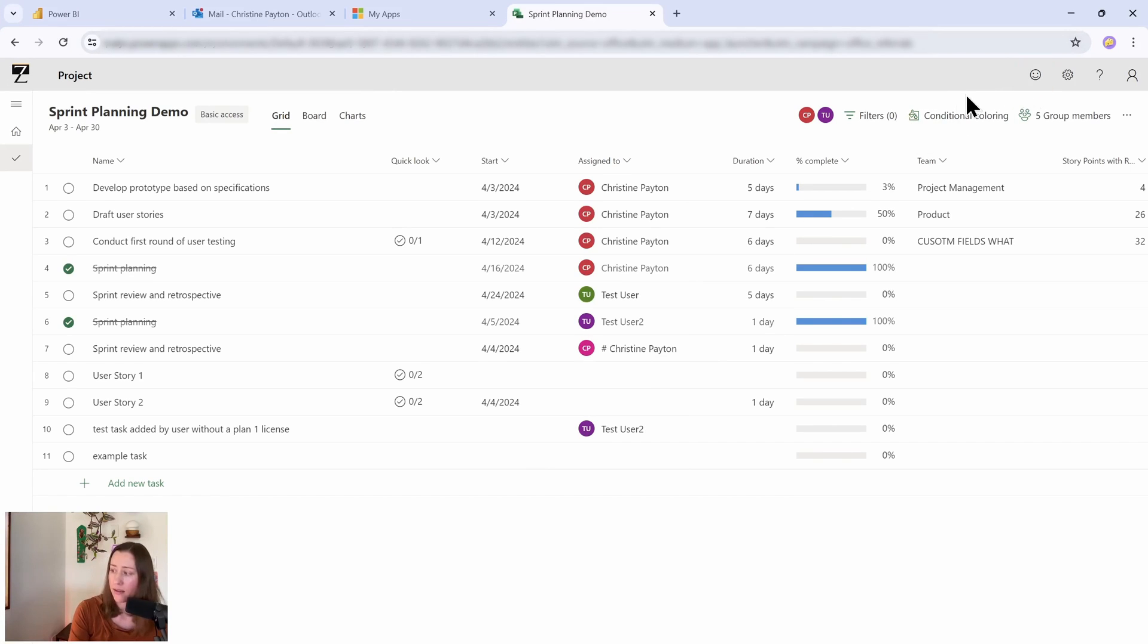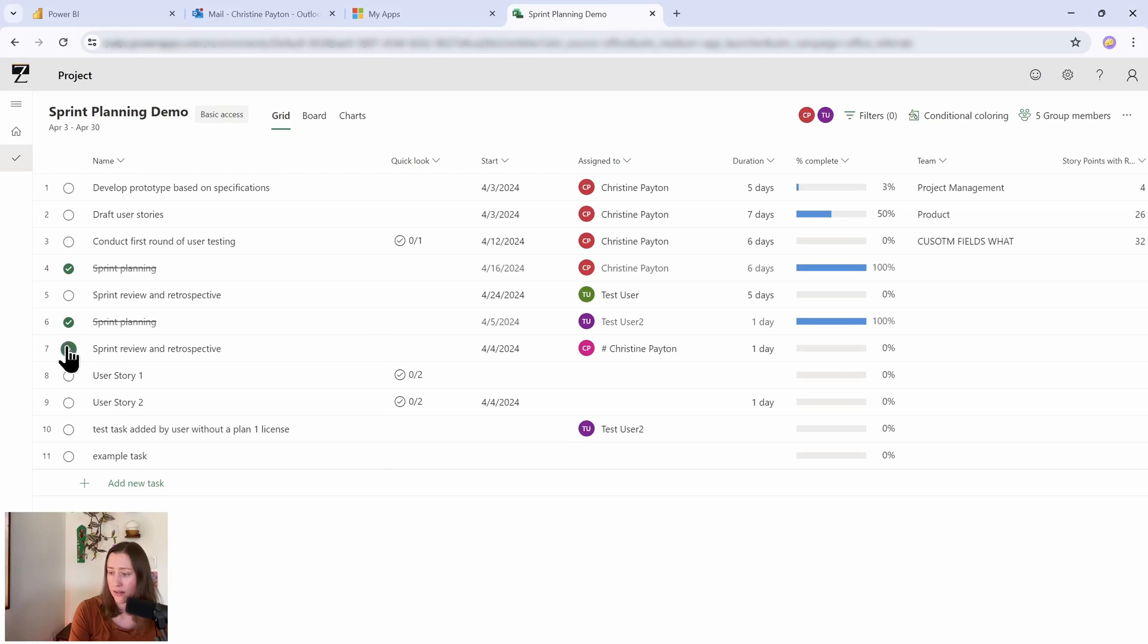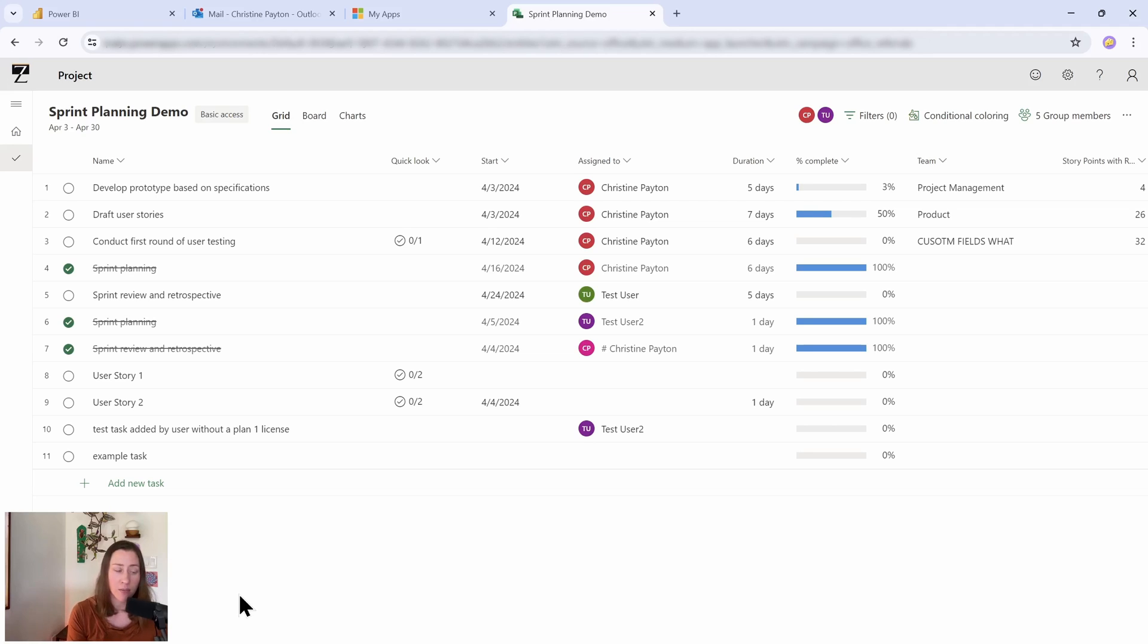And they can also add new tasks and complete tasks. My understanding is that the external users don't get the notifications that the internal users do, so just keep that in mind if you're planning to have external users in your projects.